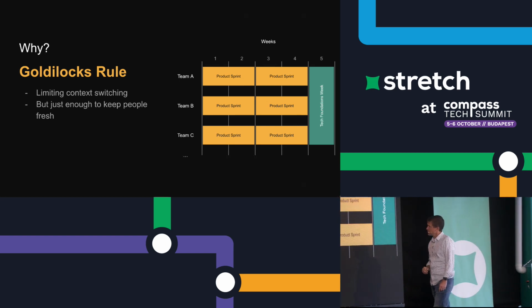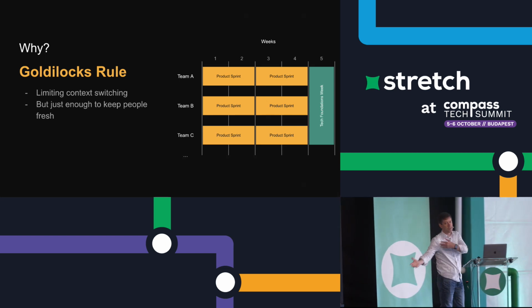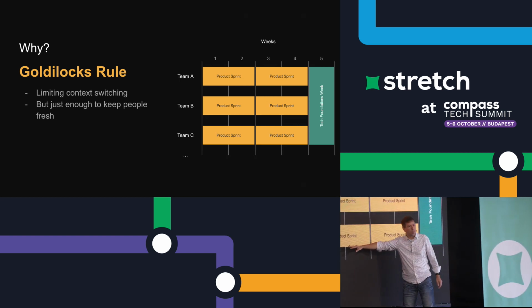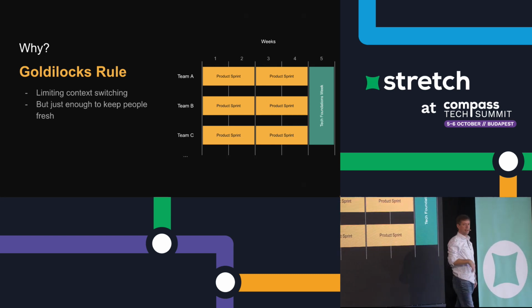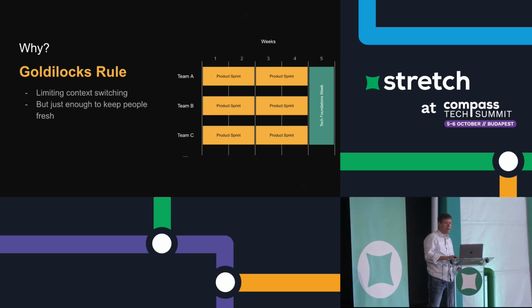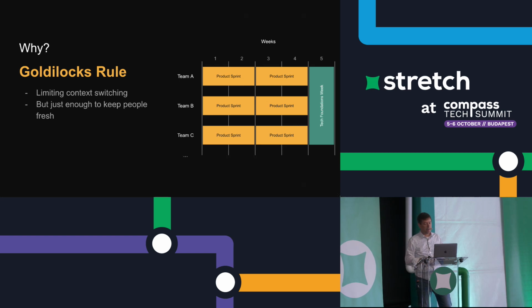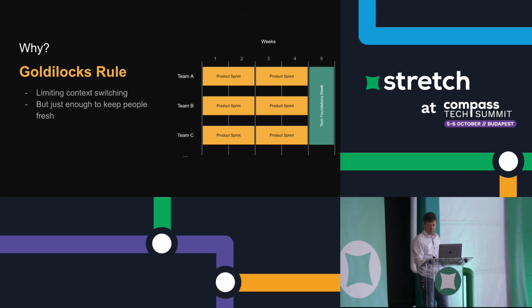So I call that the Goldilocks rule, right? You're limiting context switching. You're not going in the middle of every week back and forth between each task, one being tech foundation work, one being project A, project B, that sort of thing. But you're also getting the other end of it, which is that you're trying to keep people from being on a forever grind. Let's say you're working on a pretty good size initiative. As an engineer on Team C here, 4 weeks grinding away on that initiative is actually a grind, right? And having this tech foundation week every 5th week, I found is a nice balance: not too much switching, but just enough to keep people fresh. I've talked to some other engineering leaders that do this with the same concept but a slightly different cadence. What's right for your team could be different.